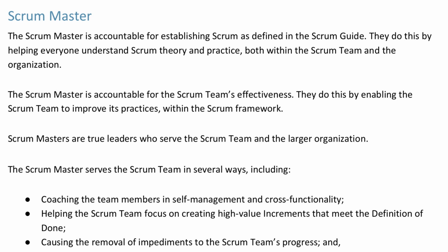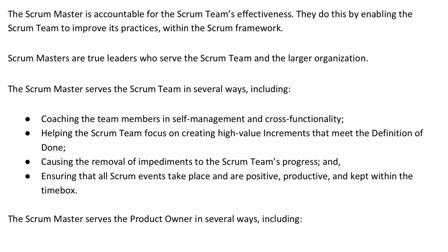They do this by enabling the Scrum team to improve its practices within the Scrum framework. Scrum Masters are true leaders who serve the Scrum team and the larger organization. The Scrum Master serves the Scrum team in several ways, including coaching the team members in self-management and cross-functionality, helping the Scrum team focus on creating high-value increments that meet the definition of done, causing the removal of impediments to the Scrum team's progress,